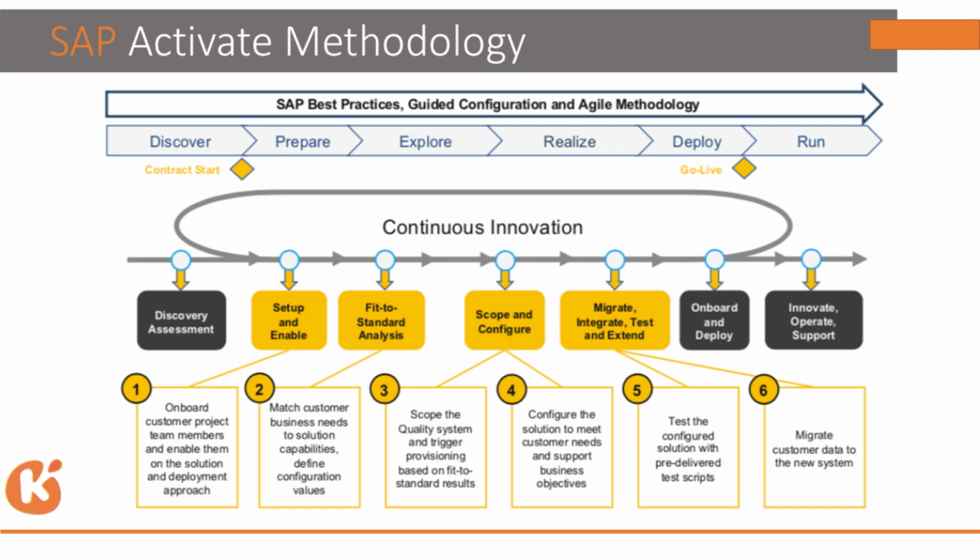Moving to production, it is mandatory that whatever configuration you have done from development to quality, you make a list on an Excel sheet with the TRs. TR means transport. Whatever configuration you do in SAP HR creates a TR request, and the TR will have all the configuration. You need to make sure of the sequence of the TRs, and once everything is completed, we send it to the basis team or security team to move those TRs to the production system. Once it is moved, we can take the live data and import it into the production system. In between there are cutover activities.